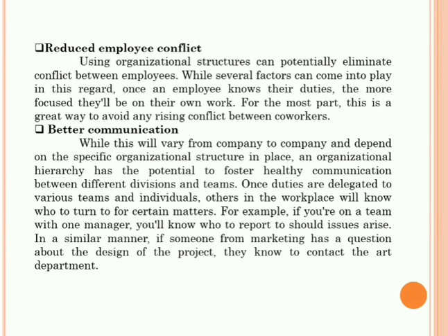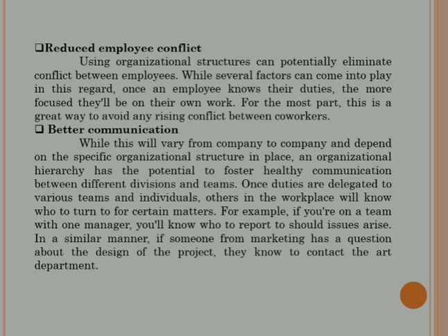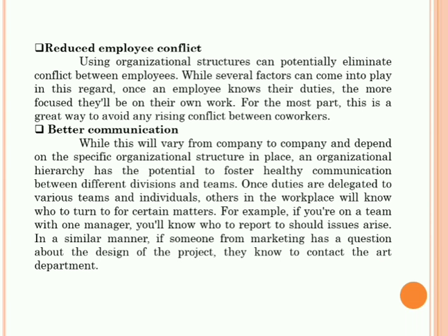In the education component, the need is for more structure than the reconstruction approach. The next thing we have to consider here is the coordination. Coordination is required for bringing unity to the various elements that make up the project, meaning bringing unity between the different members of the project. Coordination is very important. The project work is organized around the work breakdown structure that divides the overall project goals into specific activities or tasks for each of the project areas and components.